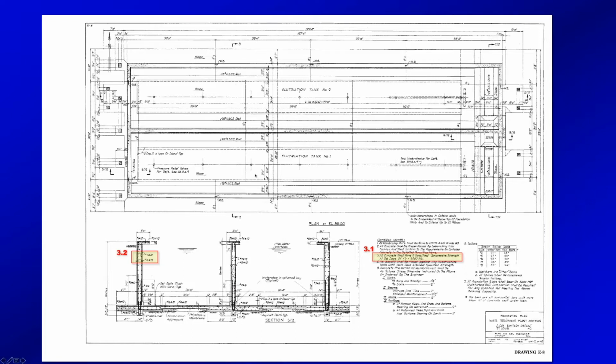Here's how I'd approach doing this. Because they're just asking you questions about E8, I actually think that's pretty darn easy. You just look, I got a plan here. Okay, this is the plan. These are the dimensions. I got a section cut. Okay, the section's cut just like I said, it's right here to here. So I'm turning, it's going off to the right-hand side of the drawing. So you go look down below, and so like I said, this wall belongs here. This one's pretty simple, runs there. This wall here belongs right there. Okay, and now I just start trying to understand that. And I could dream up a whole bunch of questions for this.